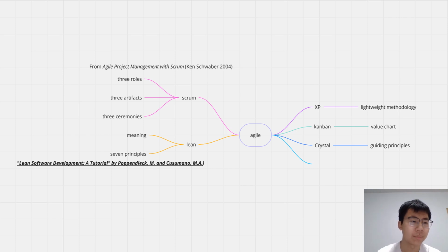And the Kanban model. In a Kanban system, the value stream is mapped on a chart, preferably a physical chart on a wall, with columns for each step in the value stream. Kanban cards are placed in the column representing the current state of the work. When work meets the policies for being complete, the Kanban card moves to the next column, and over time, the card moves from left to right across the board. You visually see work flow through the system.